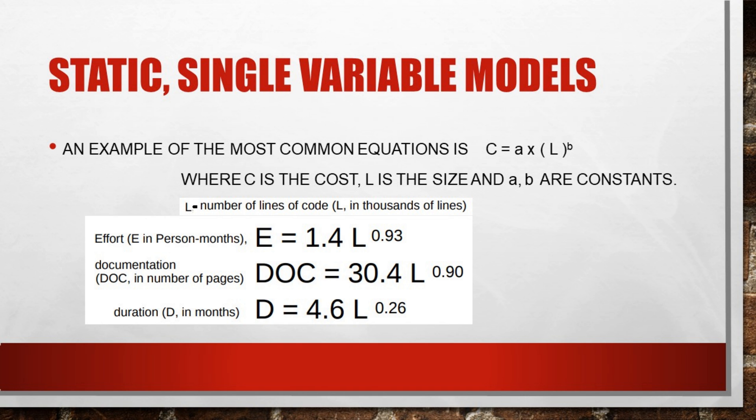Duration D is calculated as D = 4.6 × L^0.26, where duration is measured in months. The variable L is the predictor — the size of the project — measured as number of lines of code in thousands, as per the SEL model.